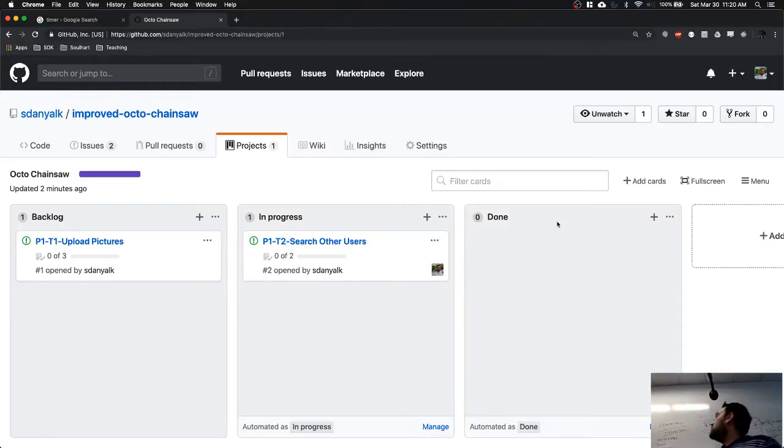So this way, you share with your team, what did you do yesterday? What am I going to do today? This is what I'm going to accomplish today. Do I have any issues, any impediments? If not, we move on, all right? Again, this meeting should not last more than 15 minutes. For you guys with 4 or 5 people, maybe like 5 minutes. Just stand up, say these things, and move on, right?